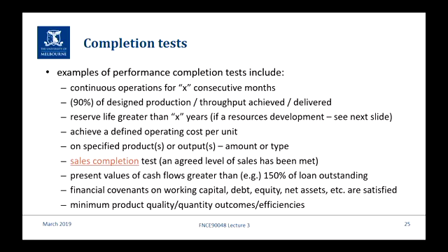So, yeah, you have to be sort of, and you haven't got experience, and in fact I haven't got very much direct experience in this, but continue operation for X consecutive months, put a number in it. 24, 36 is too much, because you can't keep the sponsors on the hook with limited recourse while it's up and running and operating. So it has to be something sensible like 3 or 6.